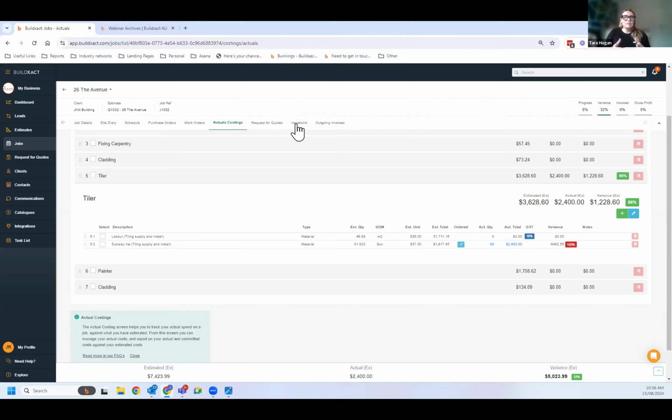In terms of adding it back into your schedule, you can just drop line items back in and then just put variation 1, and maybe have some information, or variation 2, on what that might link to. Would you go in and put it against the dark green stage claim line, or under the appropriate line that it fits under? Yeah, so you'd be putting it under that line item because it's tasks that need to be done against what that claim looks like. So that's still the golden thing, is that claim.